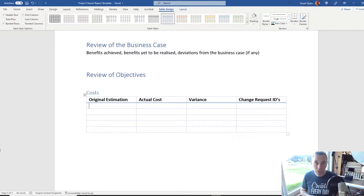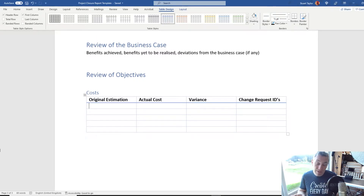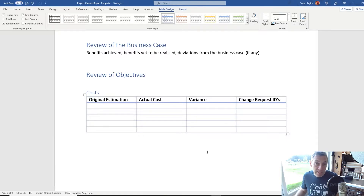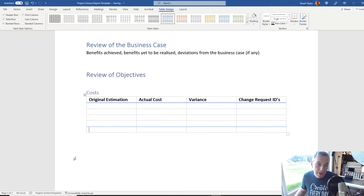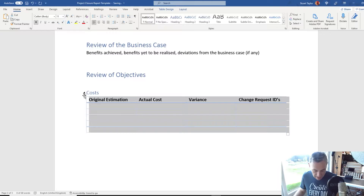On the other hand, you can go more granular — putting the stages on there, breaking it down by: figuring out how we're going to do the project, planning and designing, building, testing, and so on. Or you could break it down by internal resource cost, external resource cost, suppliers, tools, and materials. However you want to put it, it's up to you. If you go into more detail, make sure to add a total row so you can show the total original estimation, total actual cost, and total variance. Now I'm going to copy this table — it's going to be useful.